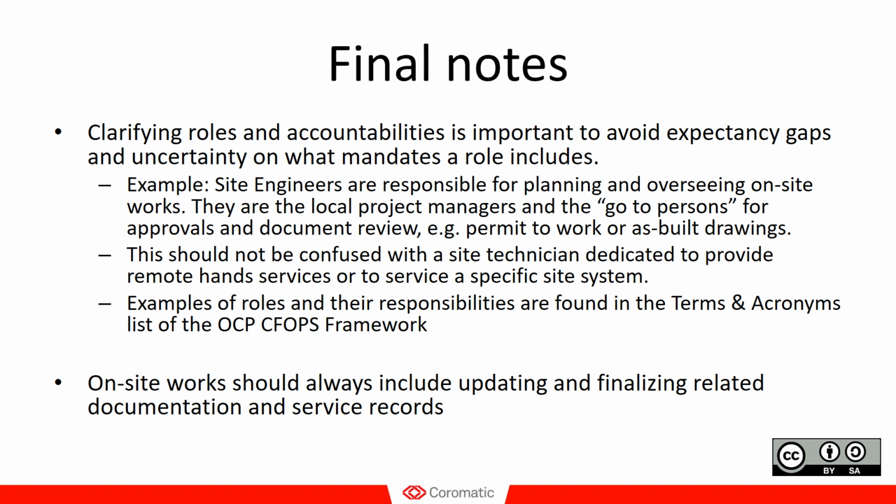So for example, site engineers should be responsible for planning and overseeing on-site works. Sometimes they're called on-site project managers, or work leaders, or some other title. But in the OCP framework, they're referred to as site engineers, and they are the local go-to persons and project managers that approve and document when they review the works that have been done. They also check or issue the permit to work and validate that as-built drawings are being updated and so forth.